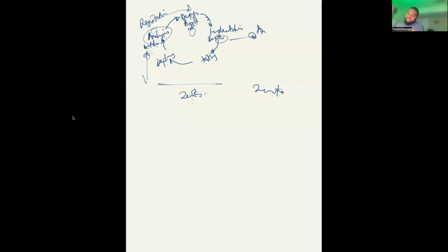And that is why sometimes, I don't want to go into details, some people have what is called pre-planning before this iteration starts, so that they can have something to start working with. Design can have something they can start working with. Implementation can have something they can start working with. So sometimes at the beginning of the project, it could be waterfall. Some people combine both. So in the beginning of the project, it could be waterfall, so that they quickly do 1 or 2 requirements, do the design, and once they have the design, they will now start this iteration. Because now the implementation cannot be idle. They need something to work with.